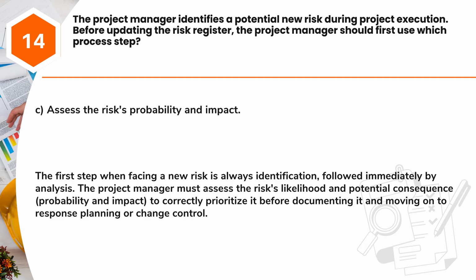Answer: C. Assess the risk's probability and impact. The first step when facing a new risk is always identification, followed immediately by analysis. The project manager must assess the risk's likelihood and potential consequence, probability and impact, to correctly prioritize it before documenting it and moving on to response planning or change control.